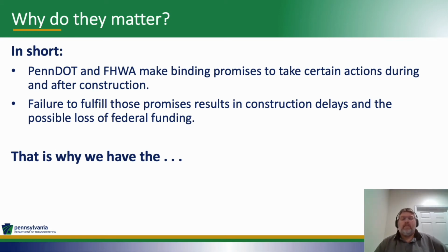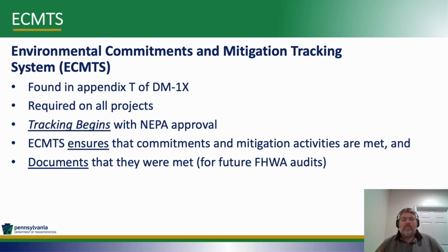So a very simple example, if we make a commitment to not stage construction materials in the parking lot of a nearby park, and the contractor goes ahead and stages in that location anyway, we will shut down the project until they move stuff out and make other arrangements. So there's a delay that happened because the mitigation commitment was not honored, which is why we have the Environmental Commitment and Mitigation Tracking System.